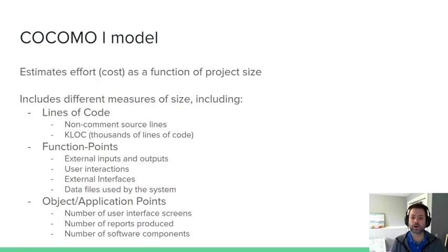So, what do we care about for COCOMO here? Generally, we're going to have six different ways to look at something minimally here. There's going to be the easy, the intermediate, and the more difficult one. The easiest one is just looking at how big the code base is going to be. Now, nowadays, lines of code means pretty much nothing, right? You can have a program that's a million lines of code and it's just a Node.js application, because it's all the packages that are coming in for that. But if you think of lines of code in terms of human effort, where I have to write 500,000 lines of code to get this particular behavior to work, you can kind of estimate how much effort that will take a person based on that.